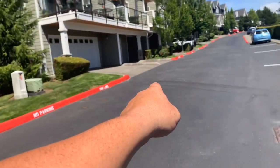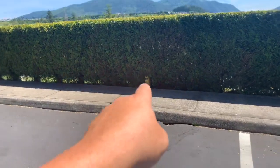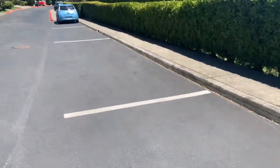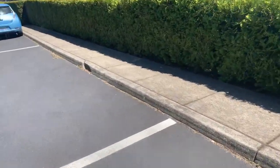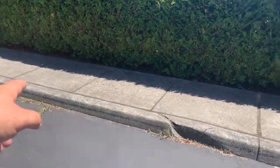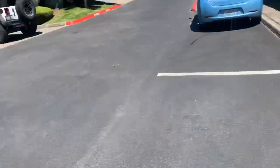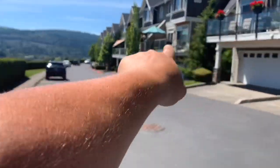Here's that 2x2 asphalt to repair in front of V1. Here's that 2x2 to repair right next to the water marker. Here's that 10-foot piece of curb to fix. Okay. I think we're assuming 6x10. We're going to fix this piece here. Actually, it goes right here, all the way up. So it's roughly about 10 to 11 feet right here. Okay, that's in front of V3. Okay, this curb is in front of V3. The other one was down by V1.